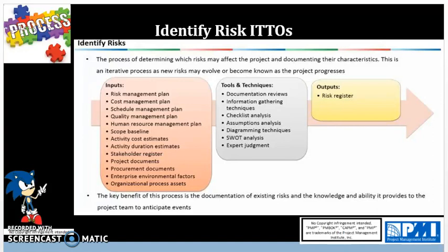Then you have the Delphi technique. As a project lead, you would want to get information on a specific topic. So you would send a survey or questionnaire anonymously to a group of experts in the field, and the experts would then respond with their unbiased professional opinion on how to proceed on the risk planning process, such as identify risk.